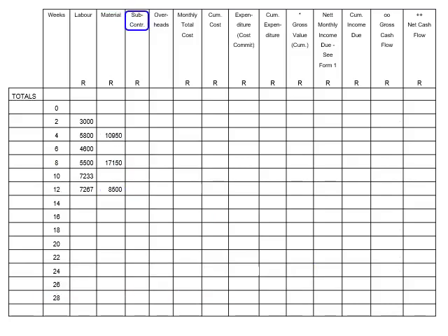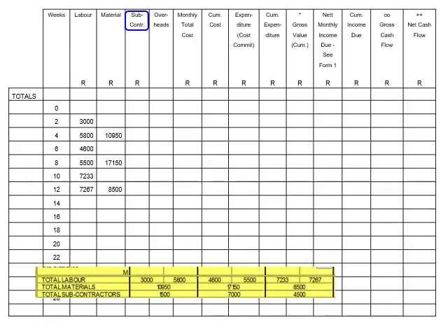When recording the cost for subcontractors, the process is the same as that for materials, thus, also recording the cost on a monthly basis, that is, at 4-week intervals, or at the end of week 4, 8, 12, etc. Again, we start off with referring to the summarized cost schedule, and find the cost of subcontractors recorded for the first month.